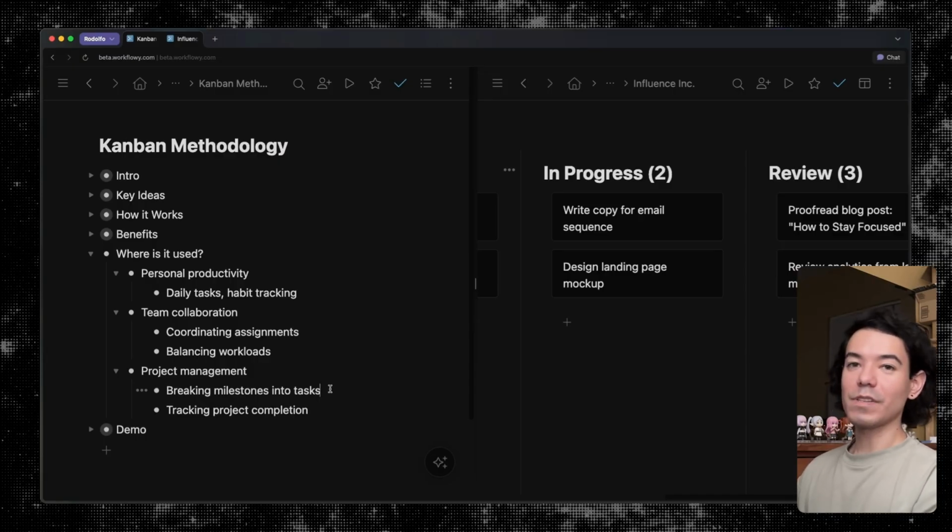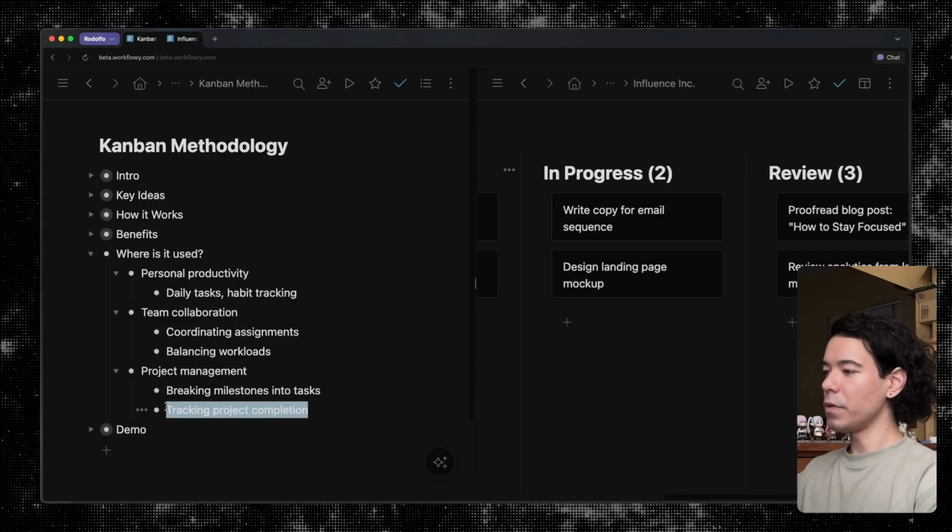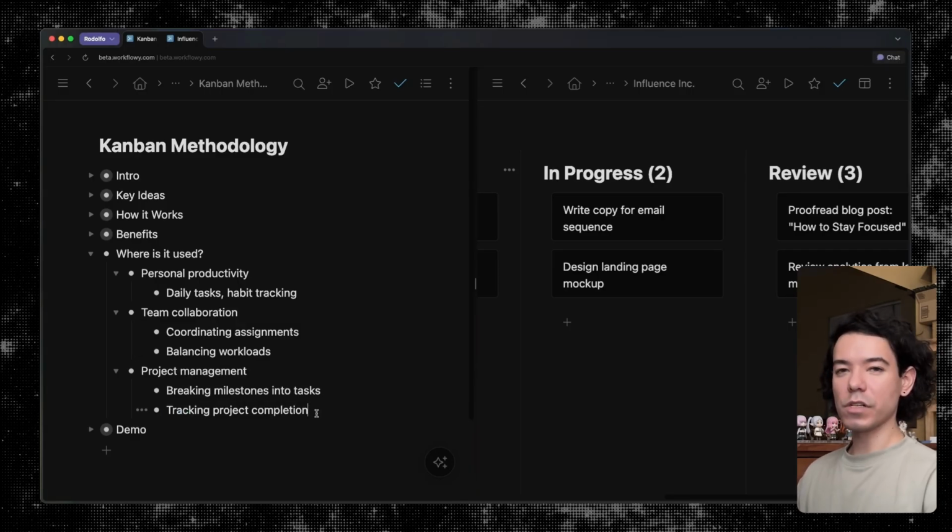And so you're going to be doing the same process over and over, and using something like a Kanban board to keep track of that is a really good idea. You get to see the project materialize over time as it starts from a list of tasks on the left side of the board and ends up into individual complete pages on the right side of the board. So it's also very easy to get a rough idea for how much of the project we still have to do.